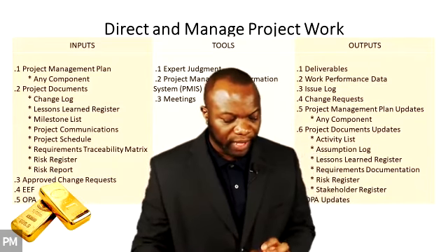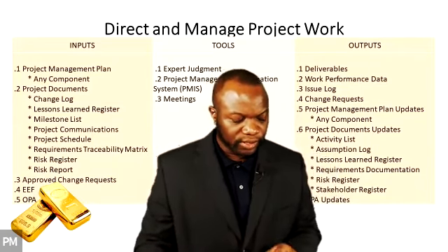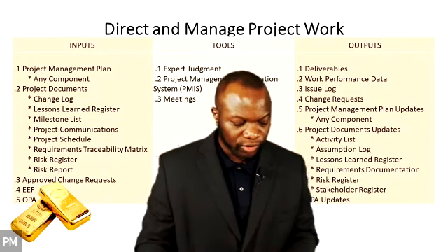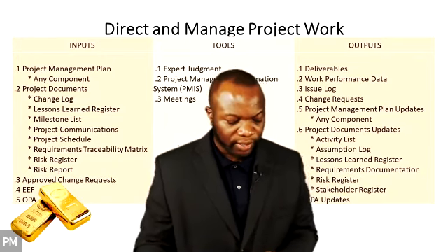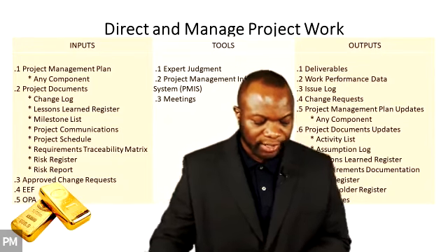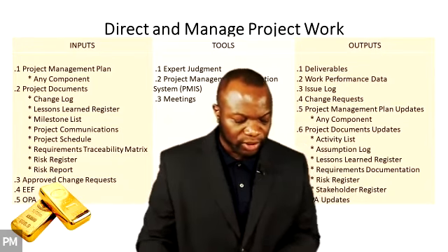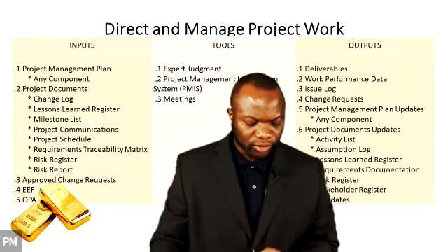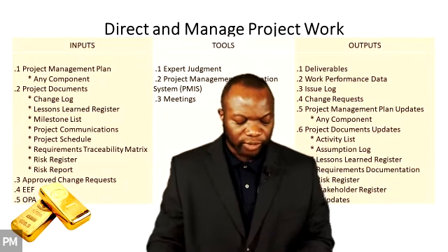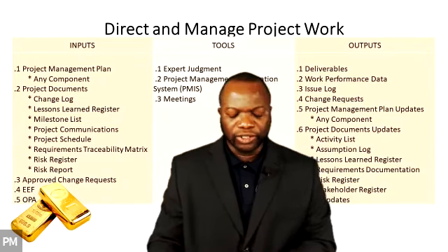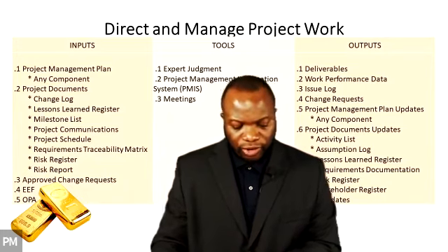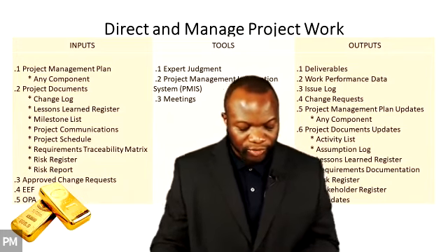Data on issues may include issue type, who raised the issue, description, priority, who is assigned to the issue, target resolution date, status, and final solution. The issue log will help the project manager effectively track and manage issues, ensuring that they are investigated and resolved.